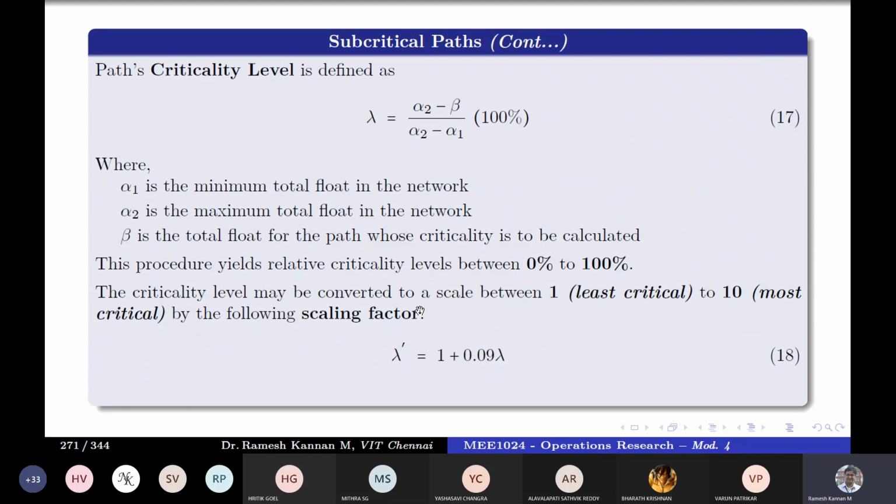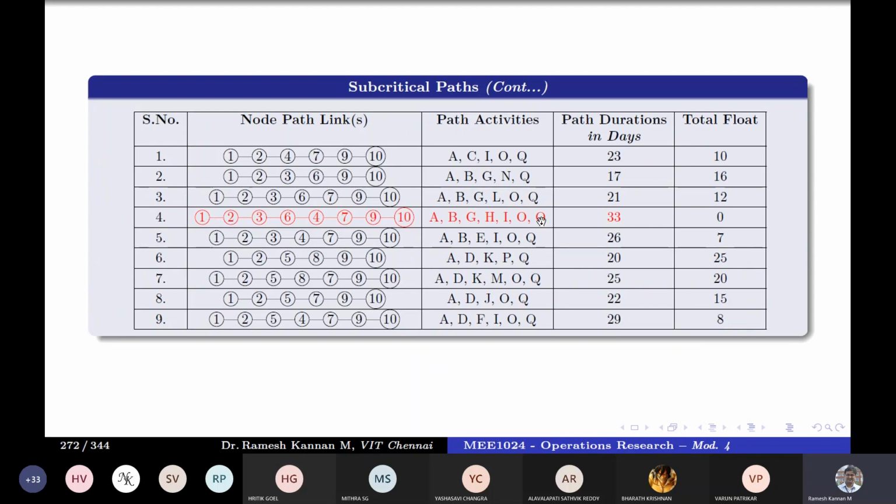What we do is calculate the total float of all the paths, and you see the critical path has no total float, 0 float. That is why it is called the critical path. If you have some value here, then there's a computation error or something like that. It's another sanity check you can use to verify your answer.